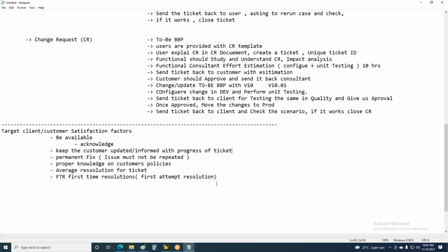Okay, so if it is a bigger company like TCS or IBM or Wipro, generally they assign, if it is implementation, one or two modules maximum to each consultant. So within HR, you require a maximum of 3-4 consultants. That's a general ideal case for a complete HR implementation. And if a ticket is raised, will all the consultants get the same ticket, sir?